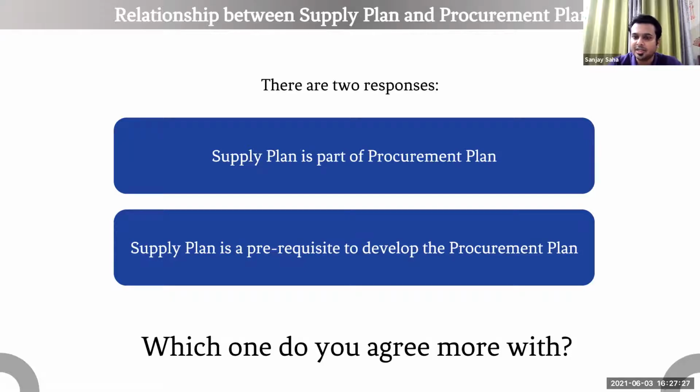Once you prepare this supply plan, let's say this is an annual quantification exercise, you send it over to, let's say, your procurement departments or tender management departments. What they are going to be doing with that supply plan is to find out when should they raise the tenders or the purchase orders so that the supplies that you need on a specific date arrive by that specific date. Okay. And that extension of supply plan, which we are going to discuss today, is the procurement plan. So it includes all the various procurement steps as well.